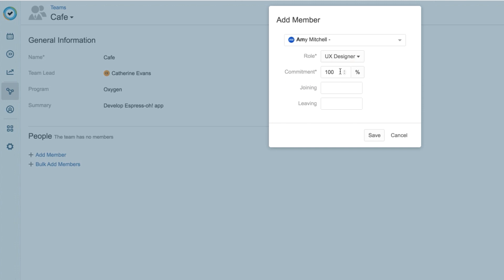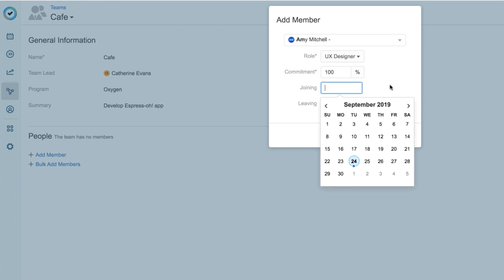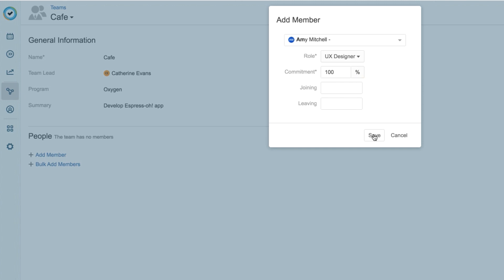This percentage matters for planning the time of shared resources when you're using Tempo Planner. I can also set the dates that a team member joins or leaves a team, so that I know when they're available for this team. Again, this matters for when you're planning time with shared resources. So I'll click Save, and I have the first member on my new team.